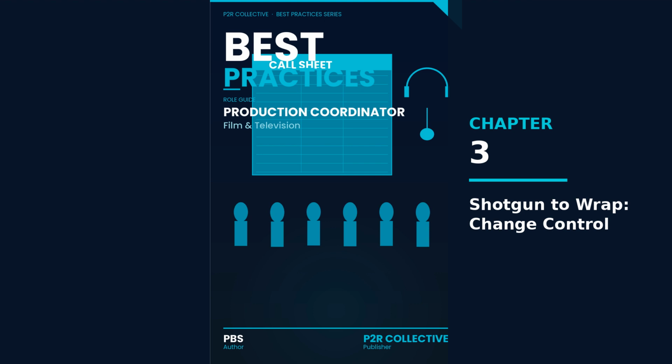Priya's setup. Run the loop in a real-day commercial scenario. Here's a concrete example you can copy. Priya receives a client note at 2:10 p.m. that triggers a hold. The client needs an approval on a product shot clean plate before they let VFX touch the final composite. Scenario inputs: current schedule truth, schedule 2026-06-08-1300. Today's key times: crew call, 8 a.m.; scene 12, product clean plate, 3:30 p.m.; scene 14, VFX composite pickup, 5 p.m.; change received, 2:10 p.m., hold scene 12 until approval.